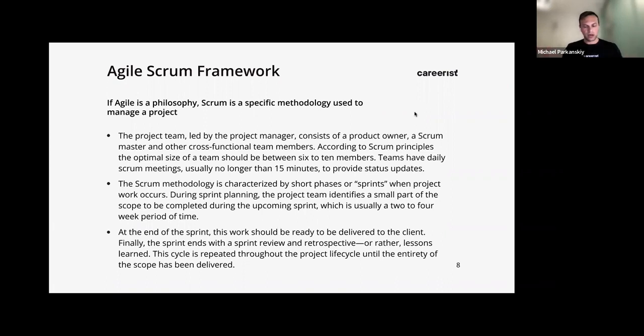So let's say your company or a company you work for is building 4 or 5 features for a customer, and they decide which features are going to go into how many sprints. You might have 2, maybe 3 sprints, right? If you have 3 sprints and each sprint is 3 weeks, how much can we deliver to our customer in each of these sprints? Can we deliver 1 feature in each sprint? Can we deliver 2 features in each sprint? Or should we deliver 1 feature in a sprint and fix 2 bugs?